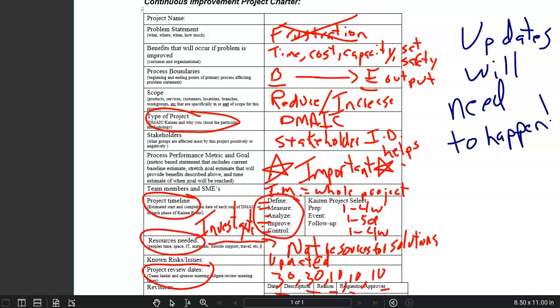I'd say let's create a very good charter. Let's not try to create a perfect charter. And one way that I reinforce this is by time boxing the period that the team has to work on this. I typically tell teams that they've got 60 minutes in a group facilitated meeting to hammer out the details of a project charter. I only give them 60 minutes if we're starting from scratch. I only give them 60 minutes if they've been given a project initiation document. I still only give the team 60 minutes to clean that up.